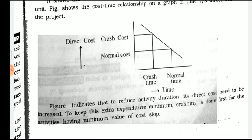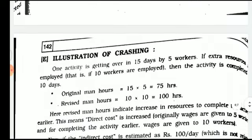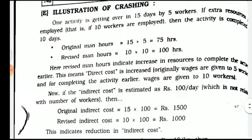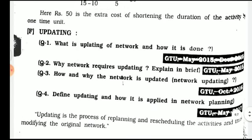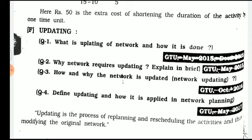To keep extra expenditures minimum, crashing is done first for the activity having the minimum value of cost slope. Now, what is updating? This question is asked in many ways in GQ: what is updating of network and how is it done? Why is a network diagram required to be updated? How and why is the network updated?